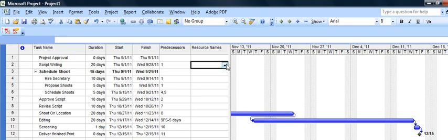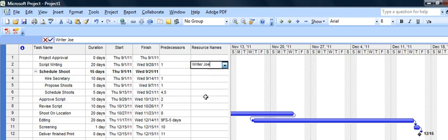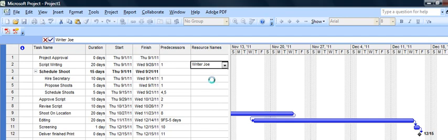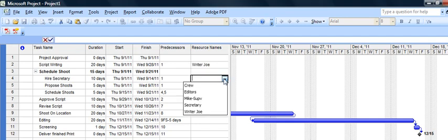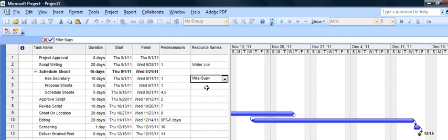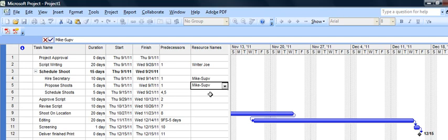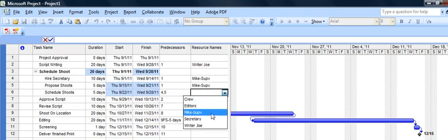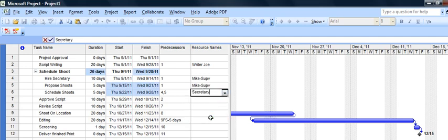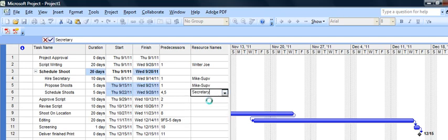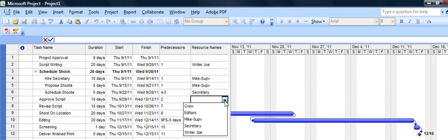So script writing is going to be our writer Joe, so he's now assigned. Hire the secretary, the supervisor is going to do that. Prepare the shoot will actually be Mike the supervisor. Scheduled the shoot will be done by the secretary. Approve the script, we didn't quite set up a producer. Let's do that now. They're not on my list so I'm just going to type in producer. Microsoft project will put the producer here.